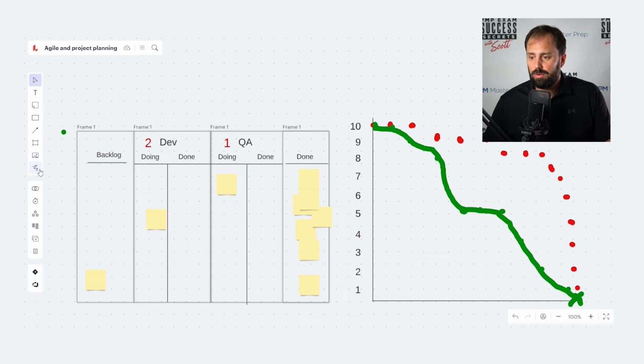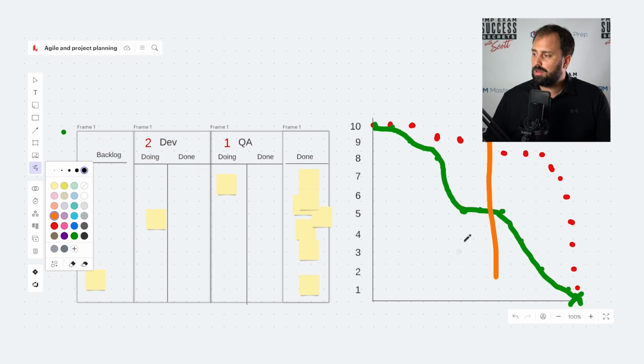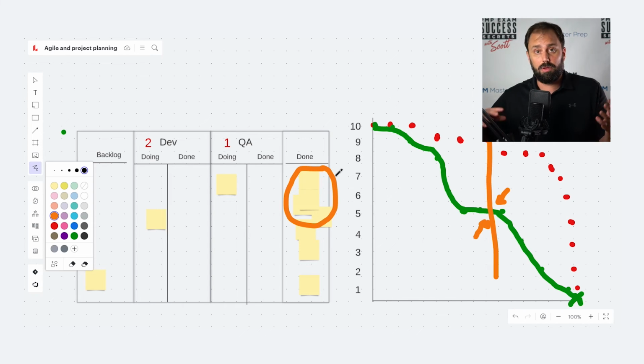Halfway through, what's our visibility to how the work's being done? It's very different. First of all, we've produced things, actually finished here. So if it was possible, we could have released this stuff in the flow model, right? We could have taken these first couple and put them into production, give them to the customer. So that's happiness, instead of just piling it up at the end. But it also creates a cleaner picture about what's happening.